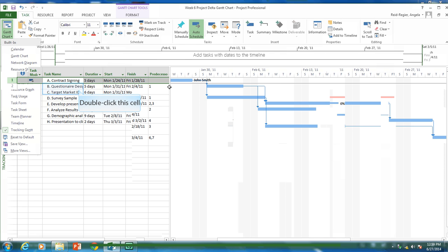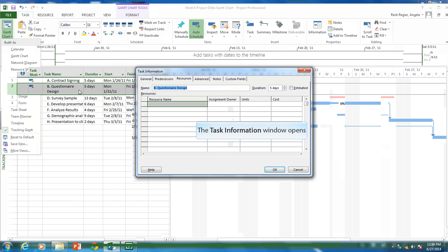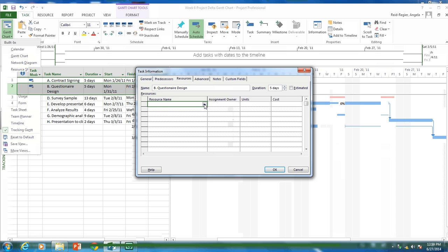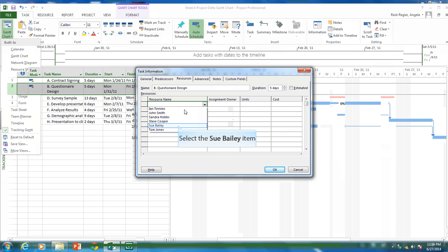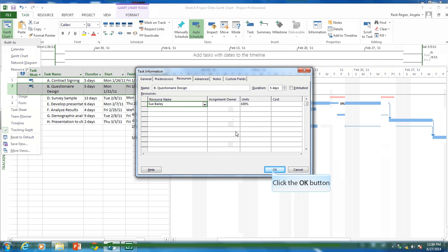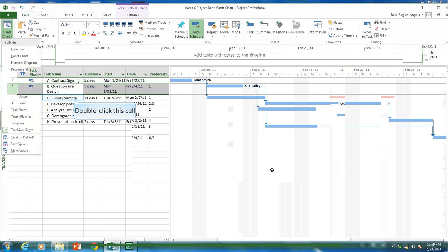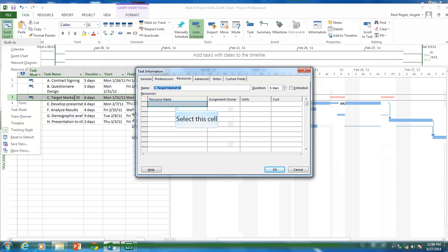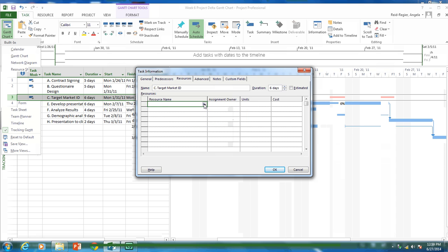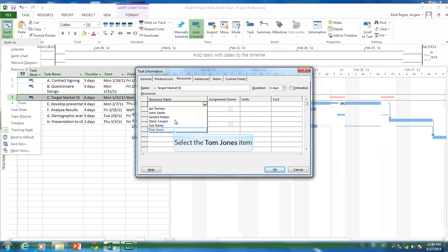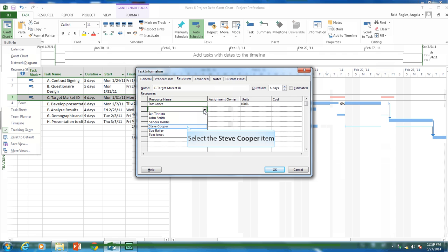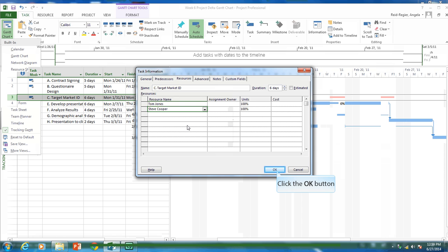So let's go to our second task. And let's put Sue Bailey against this task. Task three. So I'm going to double click on task three. And let's put two names against this. So let's put Tom Jones and let's put Steve Cooper. There are two people working on this task at a full time basis.